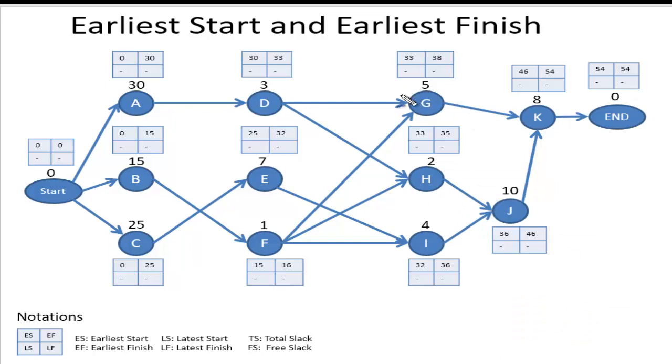Okay, now for the G, because only one node is incident, whatever the finish time is, that is going to be the start time of it. So for this one also, whatever the finish time is here, that is 16, that is going to be this. Okay, now there is a contention.